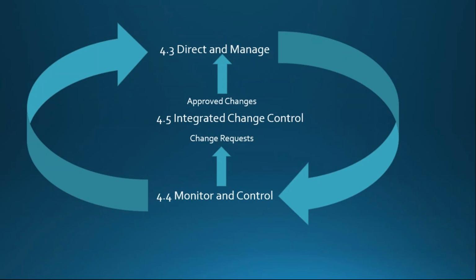All change requests, and I'll say it here, I'll say it again later in the lecture, all changes must be written up. This is for the exam now. They all must be written up for impact, for time, for cost, for quality, for however the proposed change is going to impact the project. It has to be written up, and that's your job as the project manager to write up the impacts so that the change control board, at 4.5, can review it and approve or disapprove it. It's going to be a formal board here in 4.5.